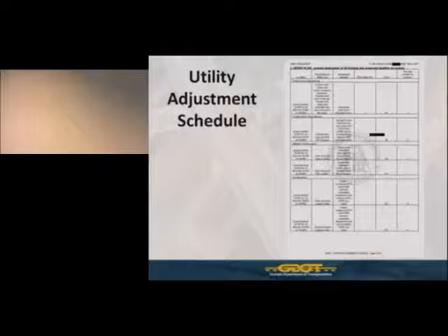And then you notice to go on down and identify construction engineering, material procurement, and then construction. And you'll notice again, under description of work, it says place all aerial copper cables or place all buried copper cables, but the dependent activities is the same as the note under section B, special requirements, that must be completely transferred and cut over before AT&T can begin. So they're saying again, they cannot do any work at all, physical construction, until all that's completed. That may or may not be acceptable. It just may require some additional discussion. That's my primary point here with that type of information.